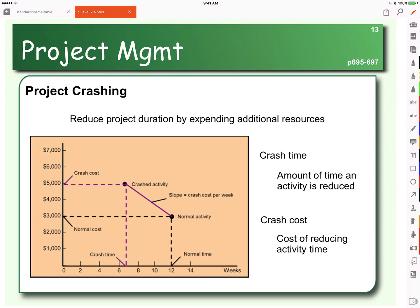Project crashing is where you reduce the duration of the project, so we shorten the project, and that's going to cost us money. We're going to have to pay overtime, we may have to rush the delivery of things. So we need to look at the crash time - how much time can we reduce an activity? And the crash cost - what would it cost to reduce the time it takes to complete those activities?